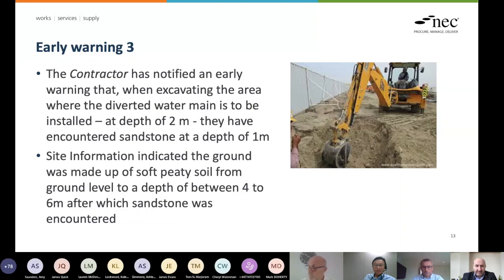Mr. Client, Mr. Designer, do you have anything else to add on this before we close it out? Not really, but I fully support further site investigation should go ahead, because I think as long as we get better quality site investigation information, certain that would be some possible impact to the subsequent detailed design development. I think that would be for the benefit of the project. So fully agree, spot on. Okay, Mark, from a client side, obviously this may increase costs in doing this site investigation, but I hope you can see the potential benefits it can bring by understanding this issue earlier rather than having abortive costs of starting construction with a design that may be incorrect. Yeah, definitely. Let's get the information promptly and come back to it as quickly as we can to make sure the permanent design is the right one.